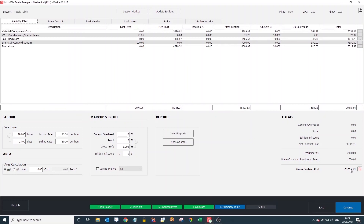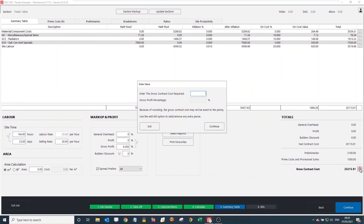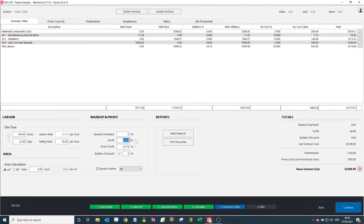Now we have our final gross contract cost. If you want, you can press the Target Value here and round your cost up or down — this is really helpful in negotiating stage if they're requesting a particular figure. Input the target value, press Continue, and it will automatically adjust the profit figure. For example, taking it up slightly increased the profit and added £84 to the quotation just to get it rounded up to the requested figure.